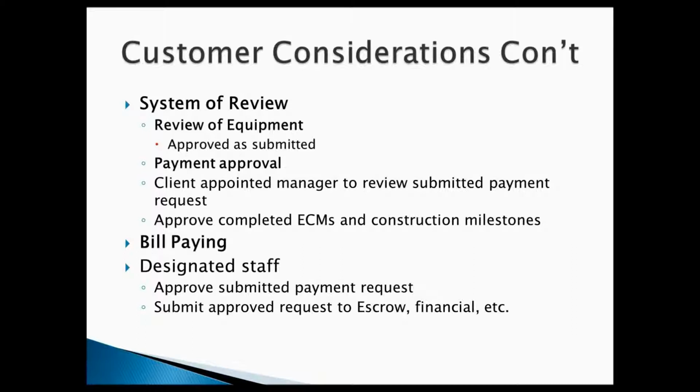Okay, I'm going to go over some more. There is a system review. You want to review equipment submittals. And what those are is all the stats of everything that you inspect of what equipment is going to be installed. This is up to the customer to approve those installations. Your panel usually consists of facilities people who will help in the approval of those equipment submittals.